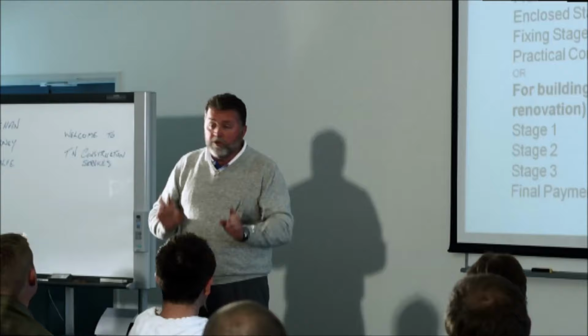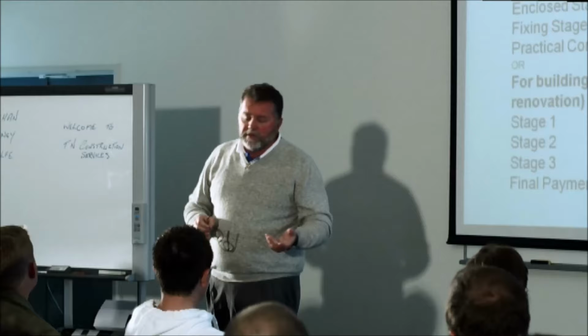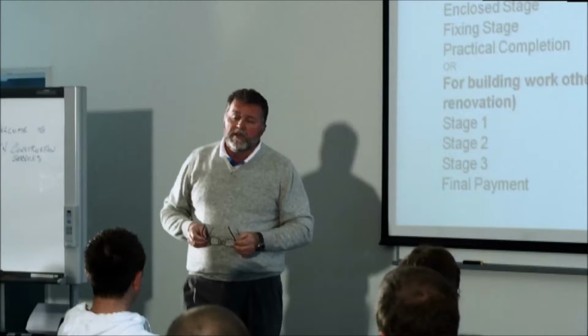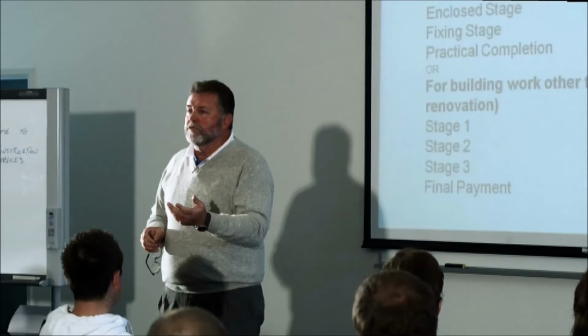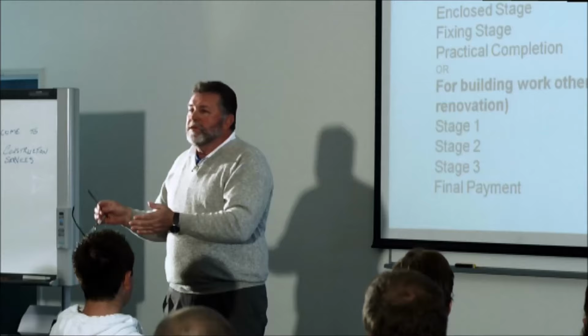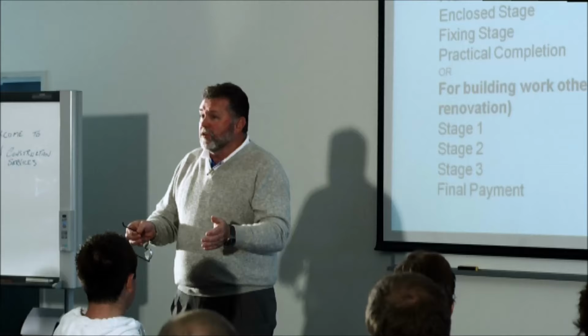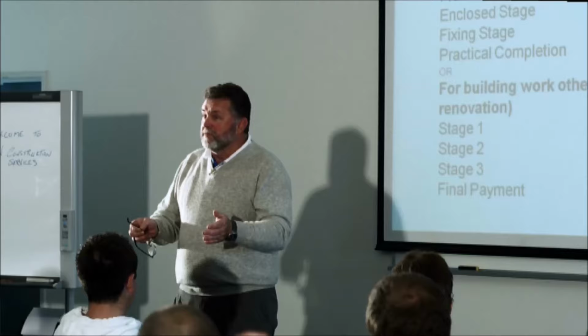The question was, does that mean that you don't get a markup or make any money on that particular part? The answer is yes. But the other part of the answer is that you can't get the insurance. If it fell over, what are you going to do? For the measly $5,000 or $10,000 you would have made, now you've got a house sitting on its side and you're going to have to pay $80,000. So sometimes it's not always about the money.